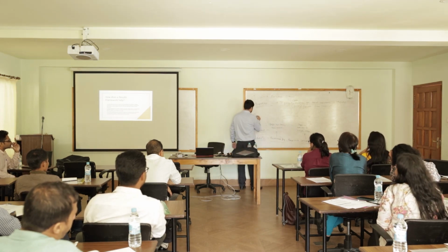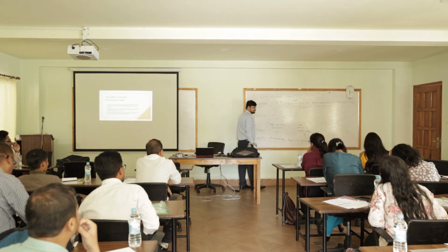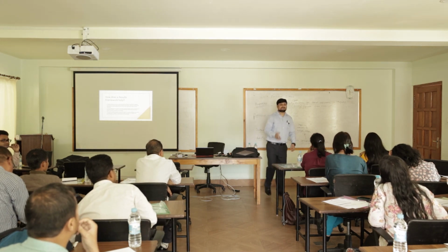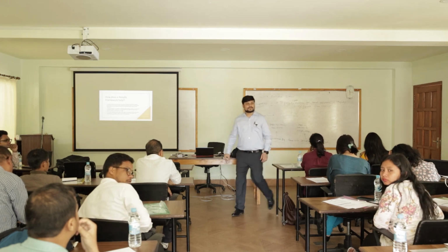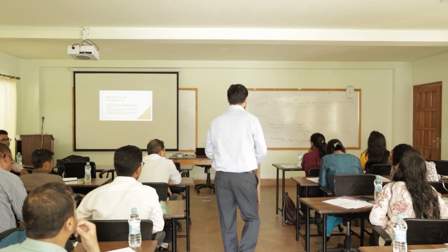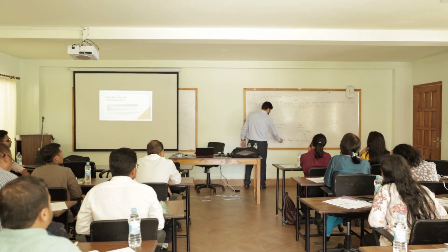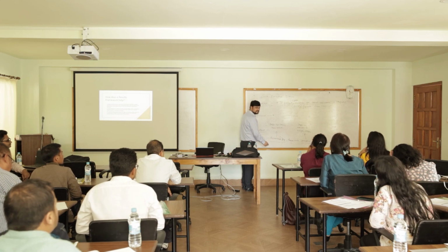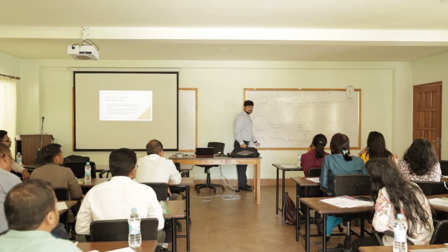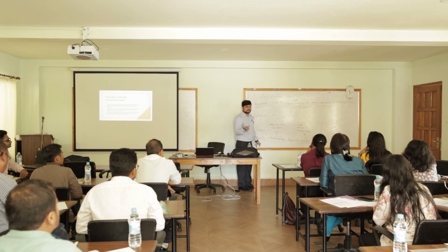What could be the outcome here? So, what would be the output indicator? Sorry? What about output indicator? The output indicator, it's very simple. If an awareness program is being organized, the indicator at this stage would be how many awareness programs have been organized.